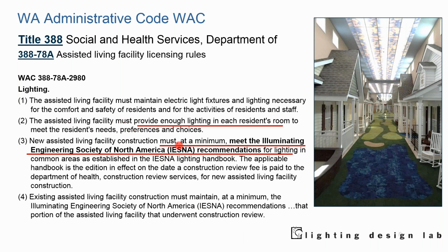I will say that this can matter. The lab consulted on a project that was denied. They couldn't open. It was an assisted living facility that didn't have enough light in the corridors. They just put in recessed cans, compact fluorescent recessed cans, like you might see in a typical apartment complex, and it wasn't enough light.